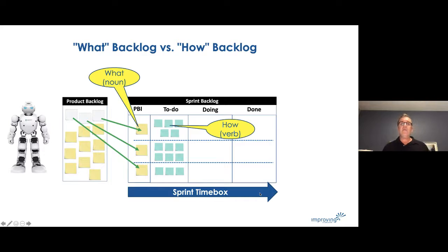As we want to get away from the old school, let's spend weeks or months building the perfect backlog before we actually start doing the work. Well, that's wasteful and it delays value. So you build as much as you can within a time box. And when I talk about a time box, I'm talking about less than a day.